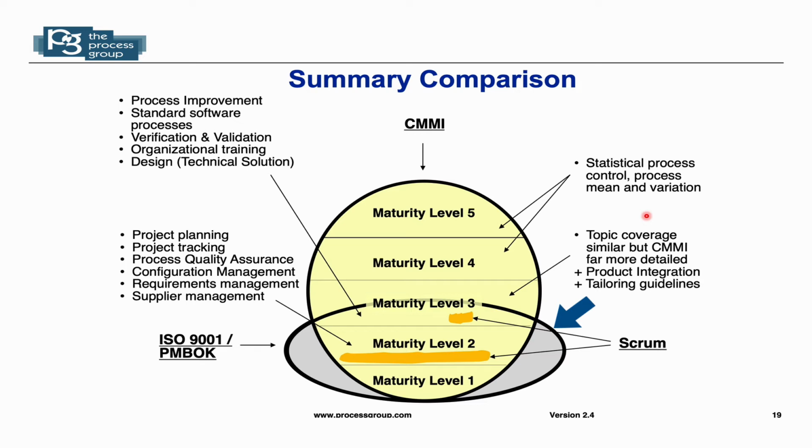If you look at the Scrum idea there, about half of level 2 is implemented by Scrum, like planning, estimation, tracking, etc., and the burn down charts. And there's a part of level 3 on testing that is done by Scrum too. So Scrum is in there, but it's a subset of the whole picture of the other 2 models.